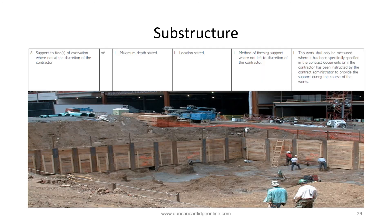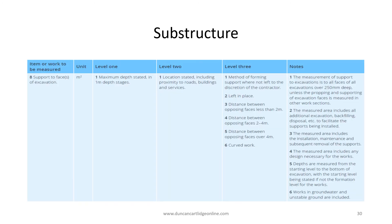Before we leave this section, let's have a look at support to the faces of excavation. The measurement of this item represents a major change between NRM2 1st and 2nd editions. In NRM2 1st edition, as shown on this page, earthwork support was only measured if the QS was specifically instructed to do so.